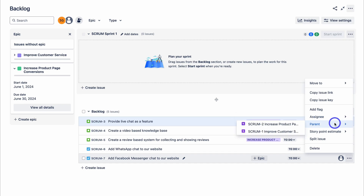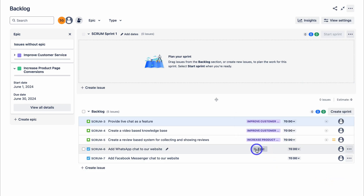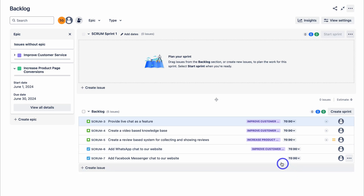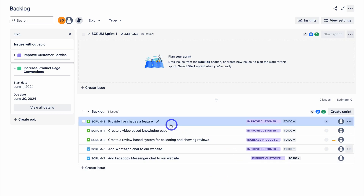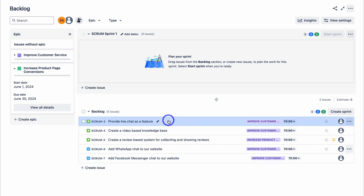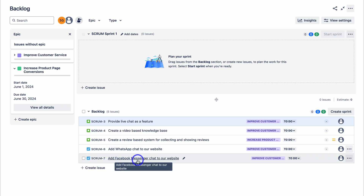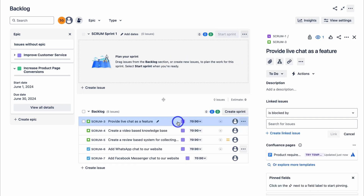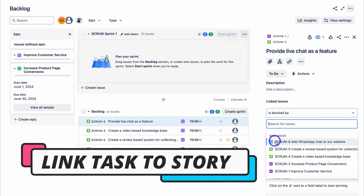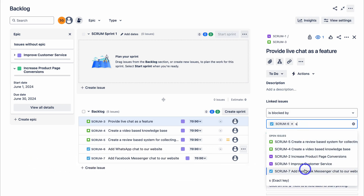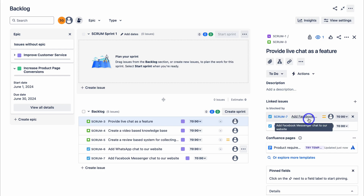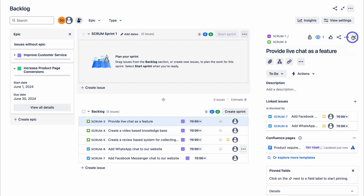With each of these work items, we can navigate over to the three dots and move them to Scrum Sprint 1. We can also move items to the top of the backlog — the most important item should be at the top. Let's navigate up to the first task and add an epic: 'Improve Customer Service.' Now, what we want to do is link this story to our two tasks, because to provide live chat as a feature, our dev team needs to complete 'Add WhatsApp chat' and 'Add Facebook Messenger chat.' Simply click on the story, navigate up to link, click link issue, make sure it's set to 'is blocked by,' search for and select the two issues, then click on link.